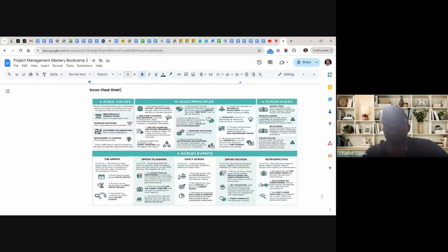And then we'll have sprint review. The purpose is to demonstrate progress, inspire the team results, and get feedback for the future adoption. So this is the time the team have to come together to say, see, this is what we've achieved this week. We committed this amount of work and we've delivered this. And we'll bring someone to come and test what we've done. So that is what we need to do.